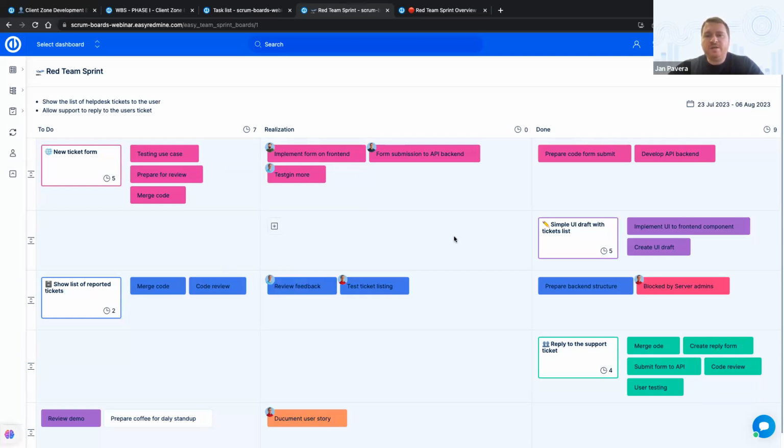So we designed this team sprint board, where each backlog item is wrapped in a swim lane, and you are able to create small sticky notes instead of work pieces in the columns, which represent the work as small daily tasks that should be assigned to a team member.